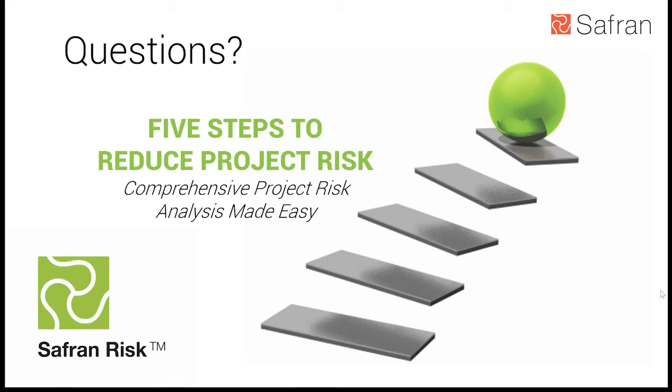There are a variety of techniques that can be used to help model that. And that's the value of a quantitative risk analysis: you can run that and say, well, we think it's not very likely, it may only be a 10 or 15% chance. Conversely, maybe part of the team is split and says, no, we think it's much more likely. Here I have the ability to compare: if it's a 10% likelihood, the schedule looks like this; if it's a 50% likelihood, the schedule looks like this.